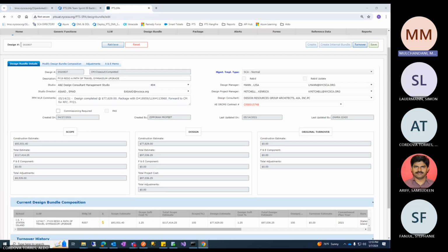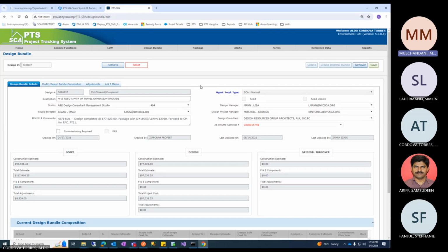So the one before, when we were done with one department, it was going to go to another department. That's where the forwarding or the exchange between the two departments happens, and the task is handed over to the next department. In this case, when the scope gets completed, the next activity is going to be done by ANE itself. So there's no concept of forwarding. Forwarding is between departments.